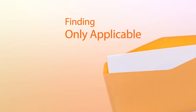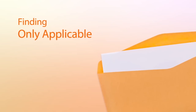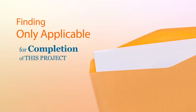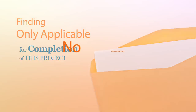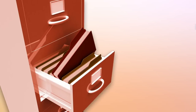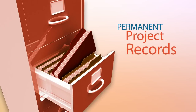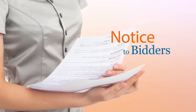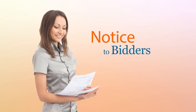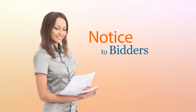The response letter from the State DOT notes that this finding is only applicable for completion of this one project and does not require re-evaluation. The project manager then places the letter in the permanent project records. The LPA includes a notice to bidders in the bidding instructions requiring that all borrow material for the project must originate from the State-owned pit.